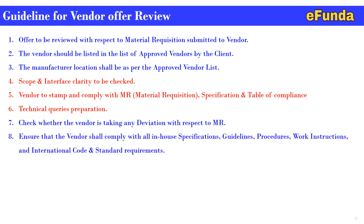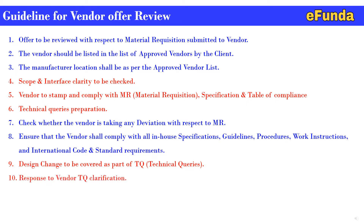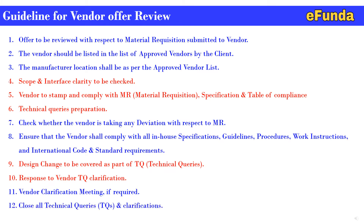Seven, check whether vendor is taking any deviation with respect to the MR. Eight, ensure that the vendor shall comply with all in-house specifications, guidelines, procedures, work instructions, and international codes and standards. Nine, design changes to be covered as part of the TQ, that is technical queries. Ten, response to vendor TQ clarification. Eleven, vendor clarification meeting if required. Twelve, close all the technical queries, TQs, and clarifications with respect to vendor offers.